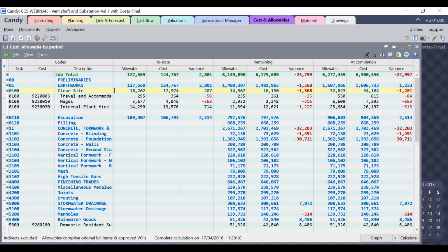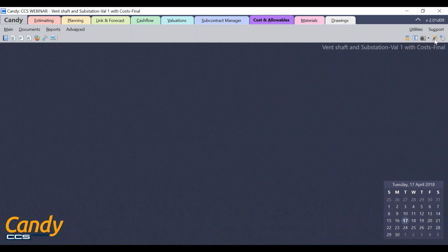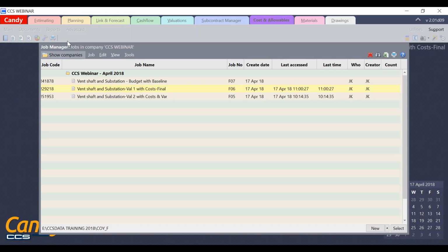For example, if we want to find what would be the effect of negotiating a discounted rate for a particular package or a particular resource rate from a supplier on the cost to completion, the cost rate function can be used. This will be useful to find the best option to minimize the negative variance or maximize the positive variance in cost at completion.